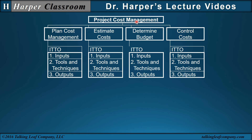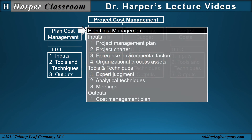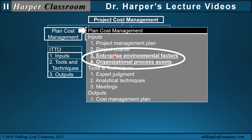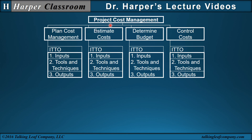For example, project cost management in PMBOK will have four processes, and underneath each process will be their ITTOs. For example, plan cost management will have specific inputs, tools and techniques, and outputs. Within the inputs, we have the enterprise environmental factors and the organizational process assets — two very common inputs and outputs. The enterprise environmental factors are external, while organizational process assets are internal, and often they are outputs used to enhance the organizational assets. So for every knowledge area in PMBOK, this is the breakdown to the processes and the ITTOs.